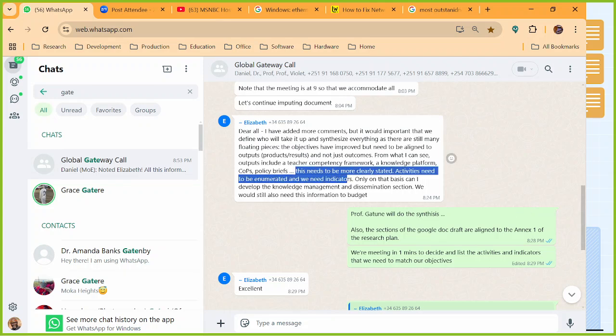But I think she's correct. To me, it's complicated when you don't get into the details early. Let's say we win the thing and then we start getting into the details at that time, it becomes quite a job to unpack. Sometimes you have to backtrack on what you had said earlier. What's your suggestion then in the next 10 minutes before you close? If we're going to follow what she has said here, we have to start conceiving what she means by these indicators that we're investigating, so that the activities are more precise and not general. Right now we have general activities.